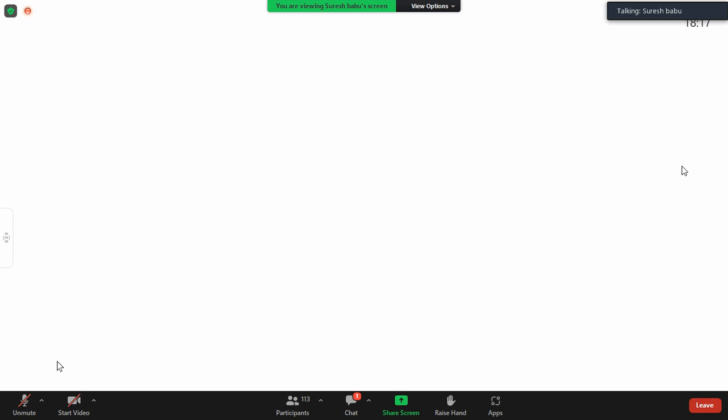One week of schedule. First week, we complete 4 requirements. I'm going to assign the tasks to my team members. This Friday, I want these 4 functionalities from you. By this Friday, I want test cases for these 4 functionalities from you. Friday evening, we'll have a review. No chance of skipping a day, skipping 1 hour. Morning 1 meeting, evening 1 meeting.